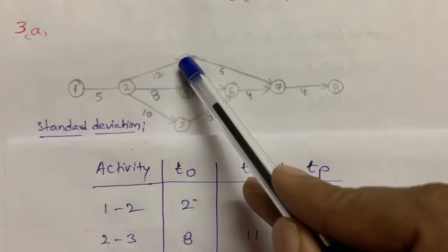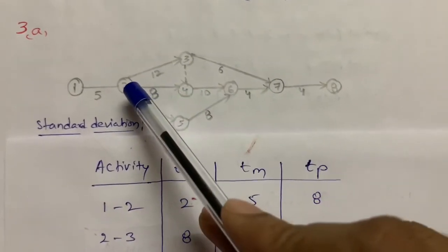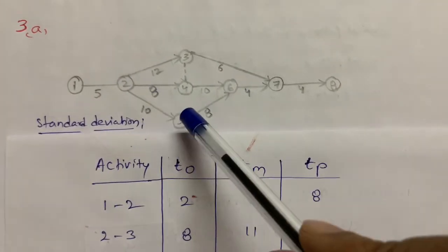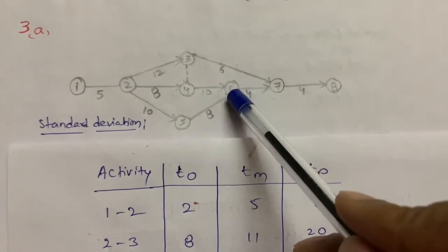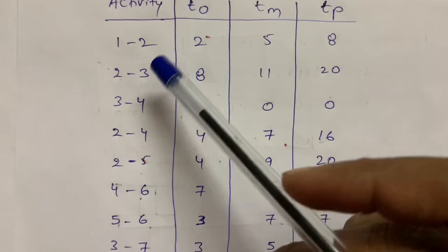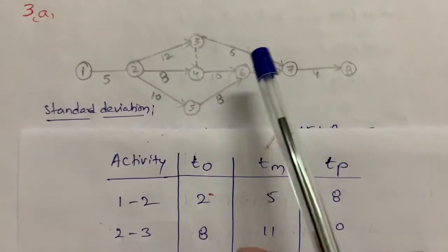After completion of 2 to 3, 3 to 7 activity is started. After completion of 2 to 4, 4 to 6 activity is started. After completion of 2 to 5, 5 to 6 was started. And after that, 6 to 7 and 7 to 8. By using these activities, we plotted this network diagram.